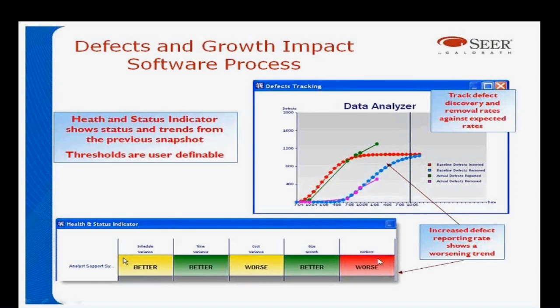That's one of the key parts of earned value or performance monitoring that make sense for software in addition to traditional things. Defect insertion and removal rates. Your project might be going down the tubes and you don't know it if you don't look at this.